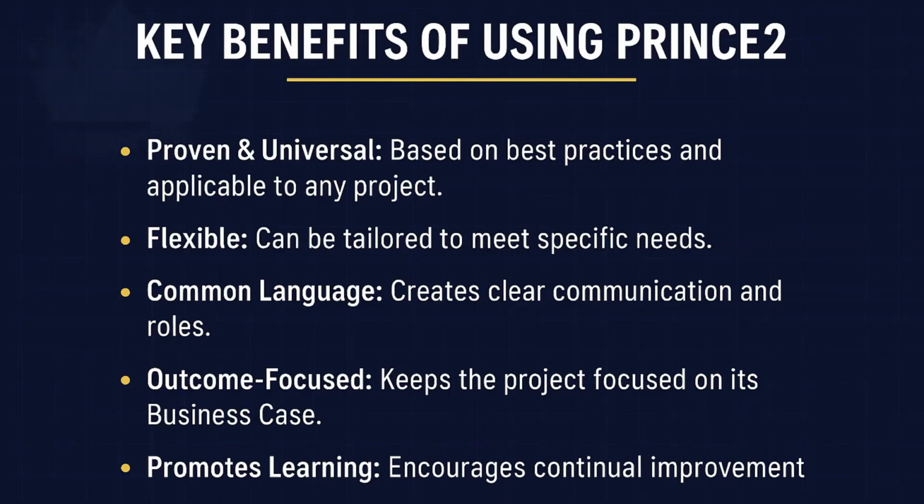But do they still use PRINCE2 stages? Yes. Crucially, they use the stage structure for control. The high-level plan described shows this clearly. Stage 1 is initiation, standard PRINCE2 startup. Here they define the product backlog and the minimum viable product, or MVP, using agile terminology within the PRINCE2 planning framework. Okay, and the delivery.